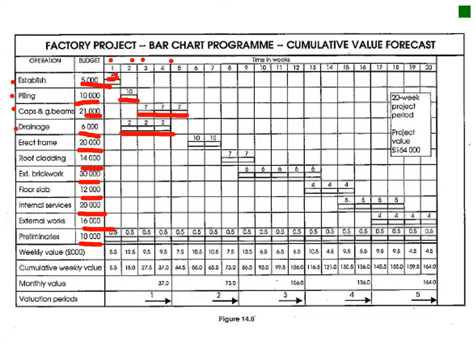You can see they made it very simple. They just divided it with the amount of time that you actually spent on it. You can actually go into more detail and divide it more evenly. If you're using a program like CCS or Microsoft Project, you can actually do it very accurately, where in the first week you will have more expenditure than say in the second week.